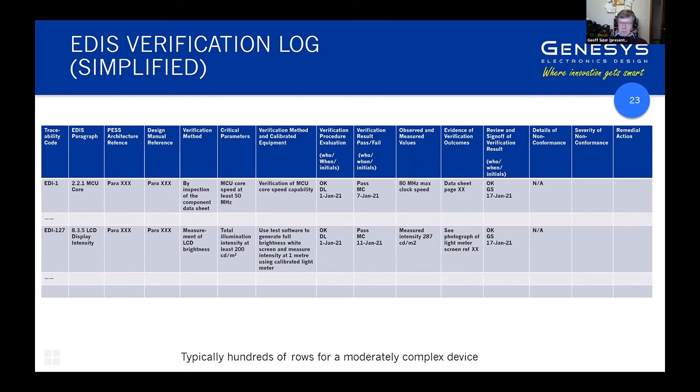If you start coming up with non-conformances during formal verification, it really is a nightmare. We've done a moderately complex device where I think we had 2 or 3 non-conformances in formal verification. That probably spawned about a man-week of work to fix. So best if it doesn't happen.